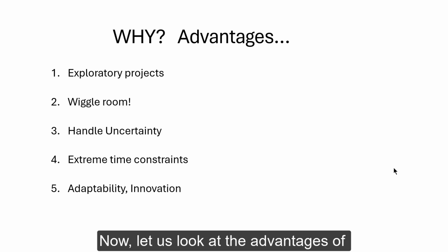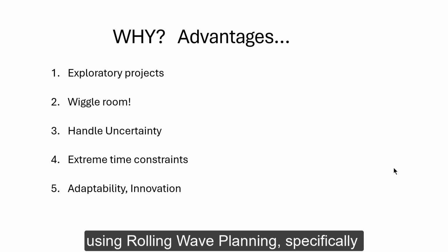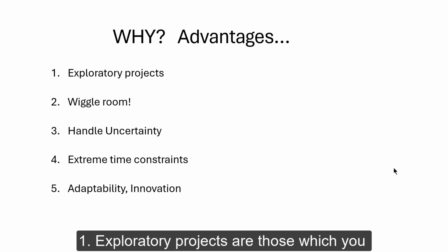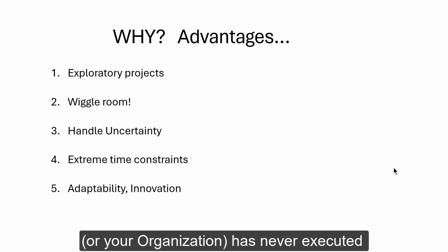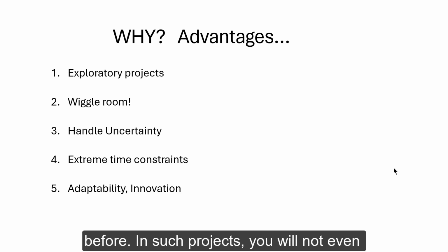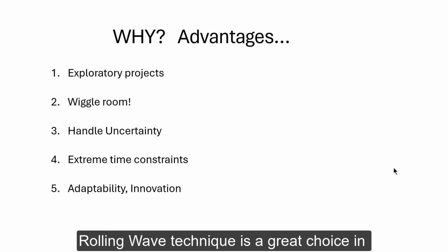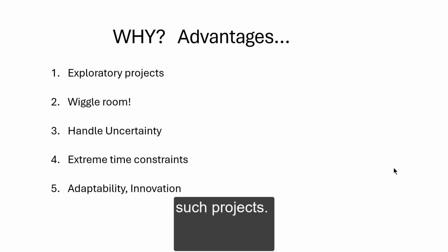Now, let us look at the advantages of using rolling wave planning specifically from a waterfall perspective. Advantage number 1. Exploratory projects are those which you or your organization has never executed before. In such projects, you will not even know how the design will unfold, and rolling wave technique is a great choice in such projects where you progressively elaborate.